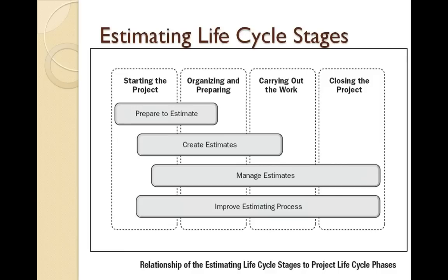At the start of the project, before we even start the estimation process, we prepare for the estimate. In this phase, we try to gather all the data about the project. We try to have some of the work breakdown structure created. We try to have the estimation approach identified and gather the historical data and all the information based on which we will create the estimates. The next phase is creating actual estimates, wherein the team works together, they sit together, and they try to create estimates, provide them to the customers, and try to get an approval.